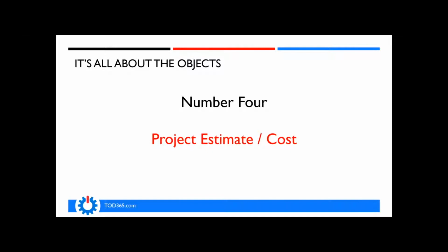And what happens is there's various numbers of all of these, so there's multiple types of forms, multiple types of reports, on and on, that exist in your current system. And you have to take a look at those very carefully to be able to do that upgrade estimate, very carefully.